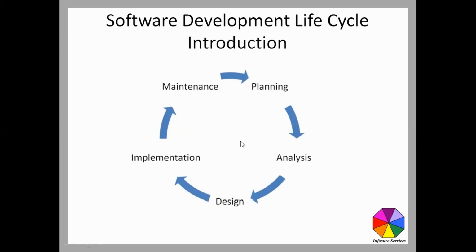The project is managed by a project manager, a PMP certified project manager who could be handling the whole project, which is a certain level of certification for project management. He goes about dealing with an issue list, a bug tracking system, a list of bugs and fixes which have to be done, and he'll interact back with the functional experts, back with the software developer to go about fixing things, and those maintenance releases also will go out on certain dates.